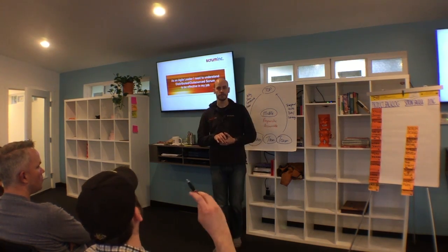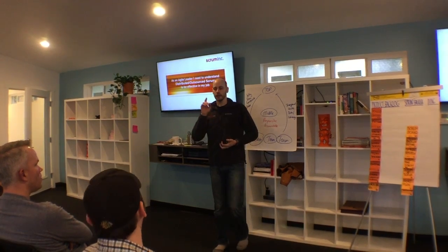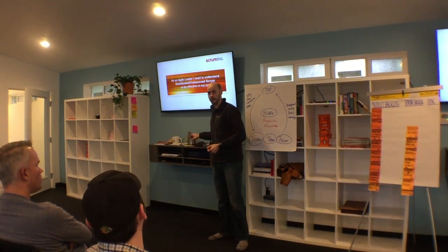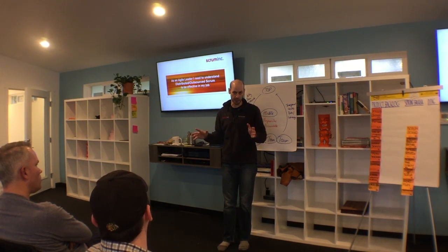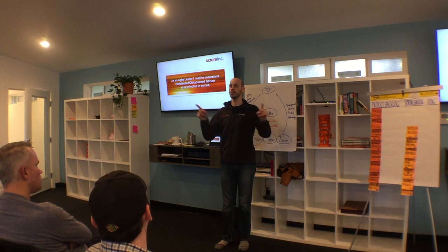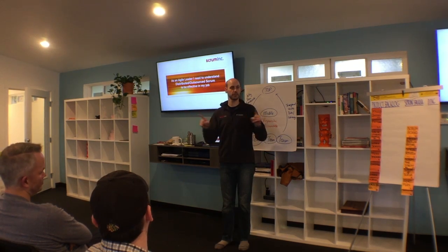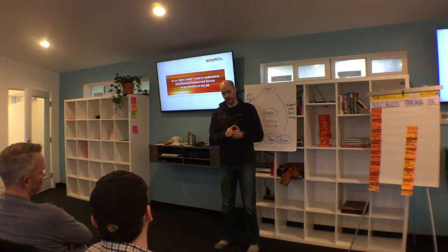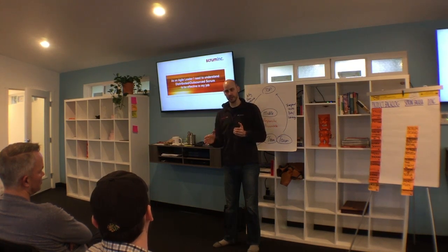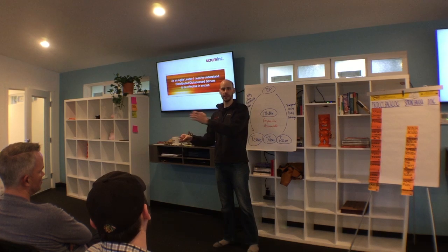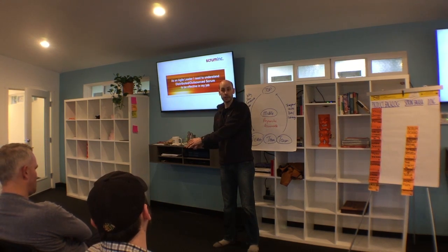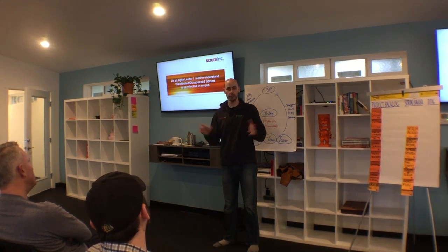Sir? Do they all have to be running the same sprint cycle for it to be effective? Okay, I'm glad someone asked because I forgot to say it. What I think I'm learning so far, this is not yet a law or a dogma, other coaches shout out if you've seen something that works better or differently, is if teams don't have the same sprint cycle, they have trouble releasing together. Say there's a team on a 3-week sprint and a team on a 4-week sprint. How many weeks will it be until they line up to release together? 12 weeks.